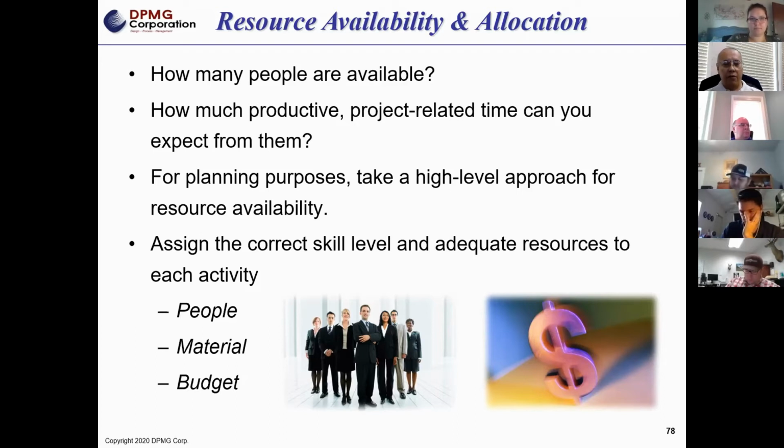Let me give you an example, and this is a real life example. In my past life, when I worked at Siemens, our projects were very long. So we always budgeted the hours for very high skilled individuals. When it came time to do the work, maybe those high skilled individuals were not there. But the big impact was if you don't have the same skill level, they're not going to be able to complete the task in the same amount of time. The task is going to take longer.